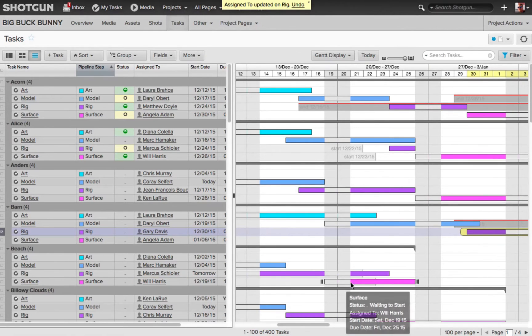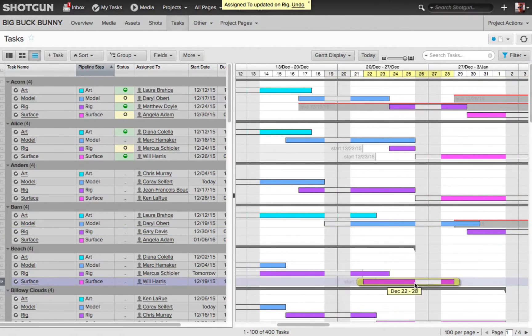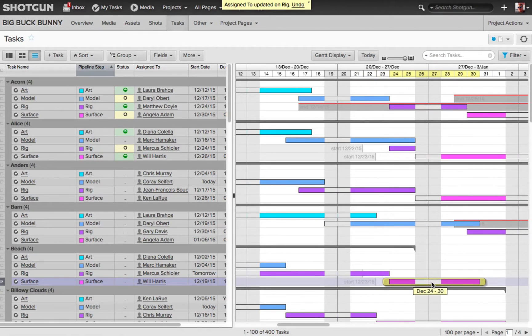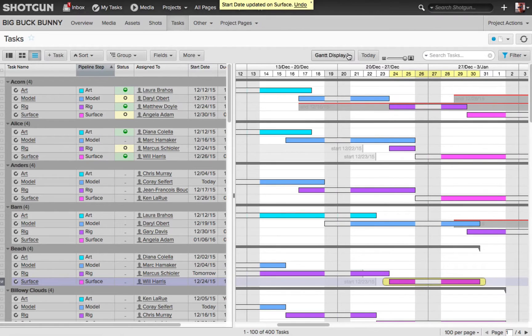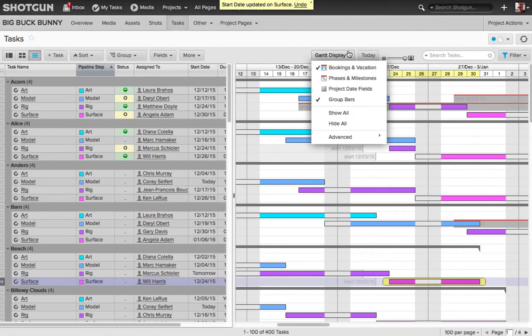I can easily change the start date for the surface task to start after the date that Will is going to start working on this project. So that's using the booking and vacations overlay.